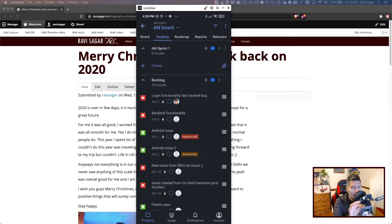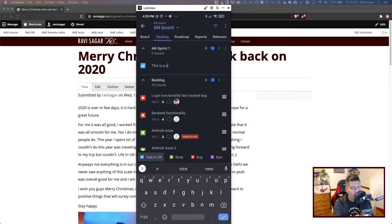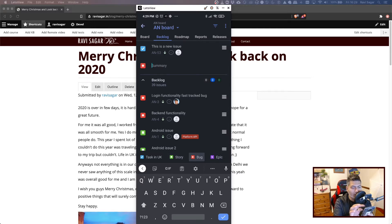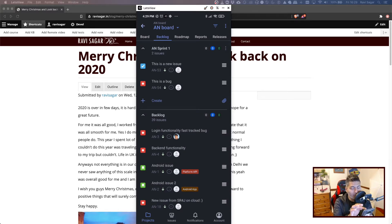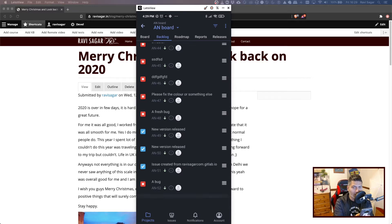So let me create a new issue. I can do this from my backlog view within the mobile app. You can also create a story or a bug — when you change the options at the very bottom, you can basically create a bug. And once you create a new story or whatever you want, you can either do it within an existing sprint or go back to the backlog. At the very bottom, you have the option to create a new story, epic, or bug based on what issues you have.